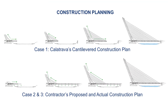Case 3 is the plan actually used by the contractors to construct the bridge. The deck was constructed on temporary supports resting on the exposed riverbed, just like Case 2. The major difference was the construction of the pylon: the sliding formwork plan was abandoned and instead the pylon was constructed using prefabricated steel caissons welded on top of each other. Each steel caisson corresponded to one pair of cable stays and served as both concrete formwork and outer continuous steel shell for the pylon. The use of steel caissons reduced pylon construction time by one third, as each prefabricated caisson was a complete assembly including concrete reinforcement, internal steel stairwell, concrete delivery pipe, components of the temporary elevator, and temporary exterior scaffolding for welding.